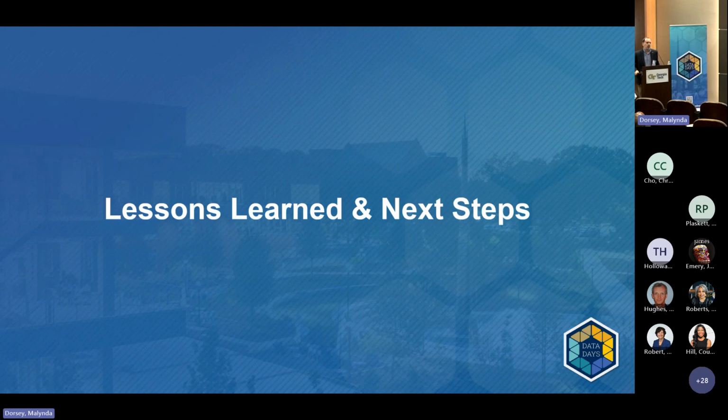So in terms of lessons learned, some of the things that have been interesting is to learn what it means, even though I had previous experience working with students. I think it's important to paint a picture that this is only 1 or 2 credit hours at most for the students. So the students typically are not going to be able to spend a lot of time on the project, and so you have to coach them, mentor them to level set objectives that they can accomplish at the end of the semester.